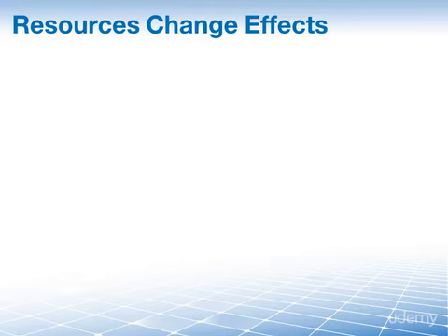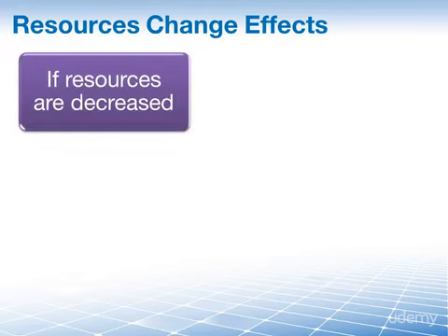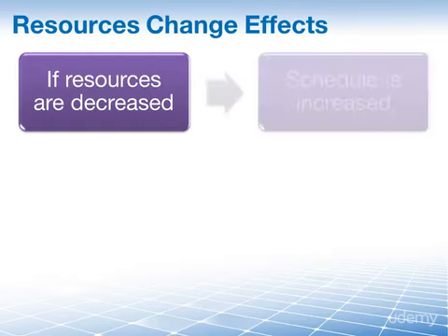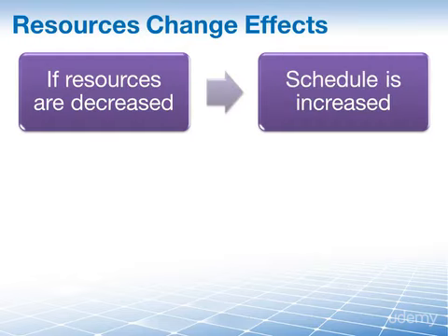and your risk. For example, if your resources are decreased on a budget because some machinery is pulled off to be used on another project, then the schedule may need to be extended because it will take more time to complete the original work. You don't have that machine now, and all the labor has to be done manually. All right? So far, so good.